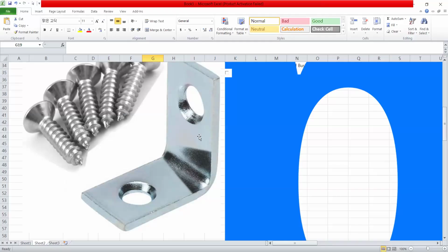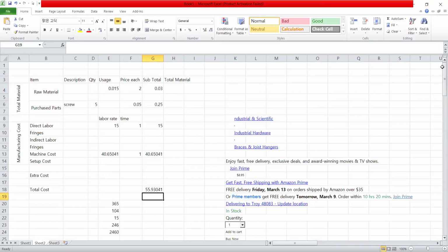So it's not something that I will be scared of, how I'm going to find the material rate. It will be given to you. You will look at the bill of material, you will find out the grade, and if it is raw material, you have to worry about the usage, like what is the weight, and the rate will be available. You will multiply these two and you will get the final number.